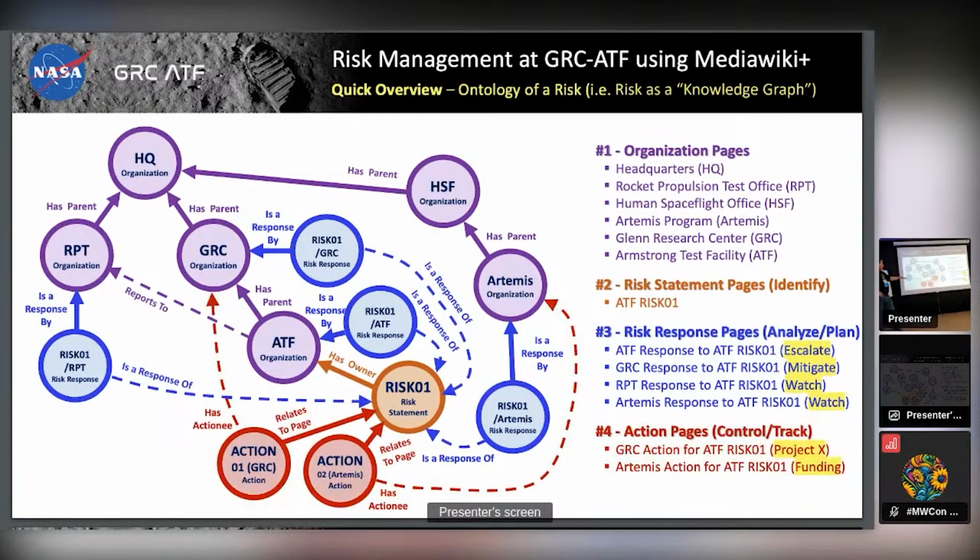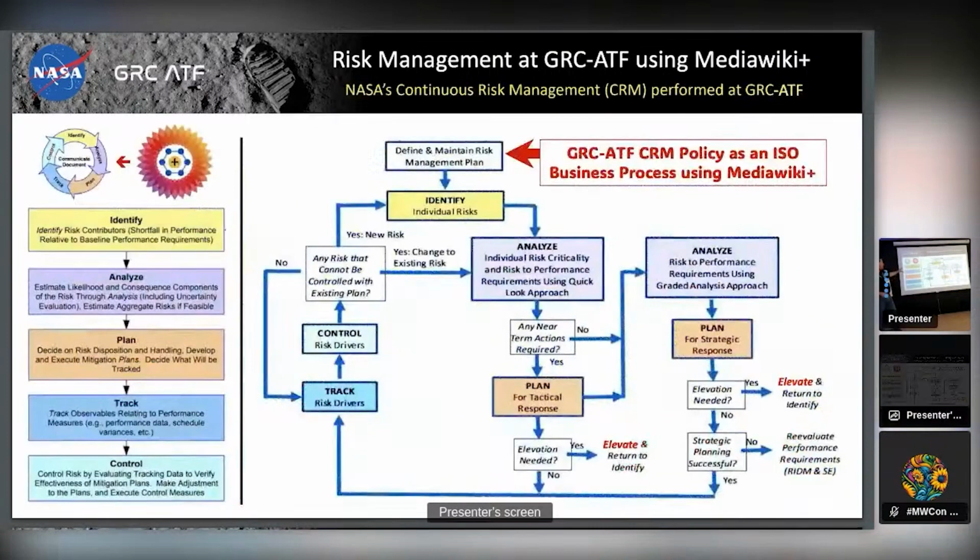Lastly, we add actions. And so at some point, because we have documented our risk and we've communicated the risk, and we have multiple stakeholders responding and analyzing that risk, some of the people have decided to watch. That basically means thank you very much. Let us know how that goes. And other people might say, well, hey, look, this is a real problem. I've got to escalate this above my head. And then you also have people who say, we've got the funding, this is our responsibility, we're going to mitigate this.